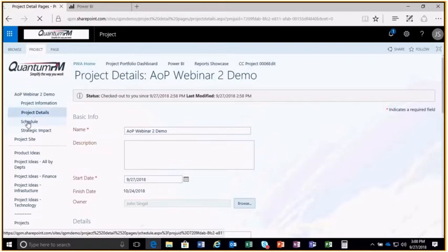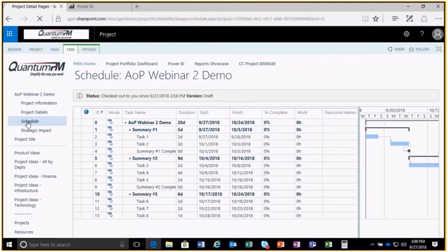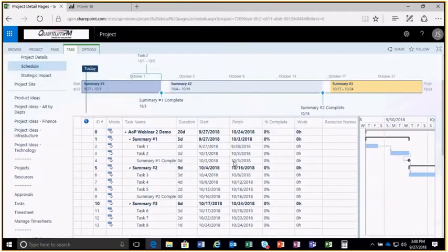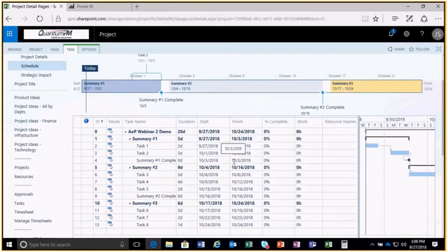Project schedule. The project schedule is very useful because this is a default structure that's been used and associated with this particular project type. And what it captures is standard processes that you want to use for this project type, standard durations. It gives you default resource categories that can be assigned to these things, puts it into the taskbar.